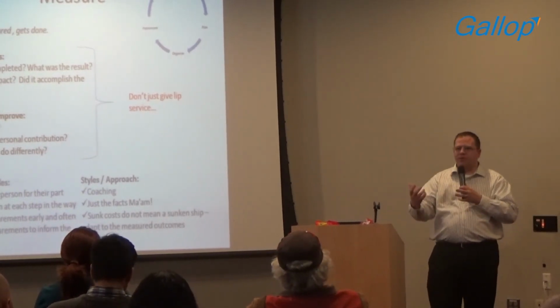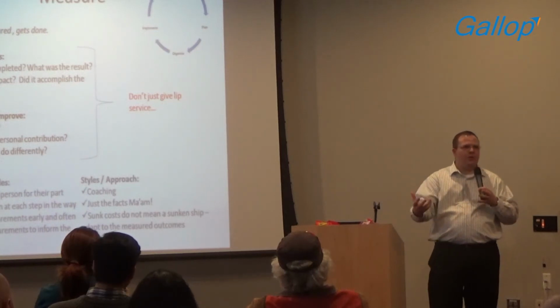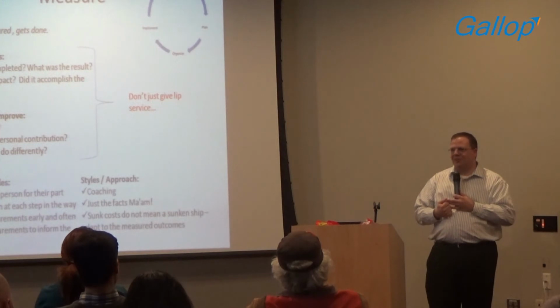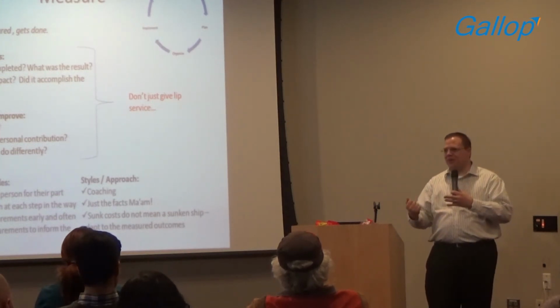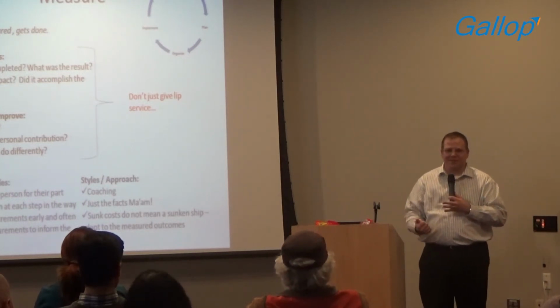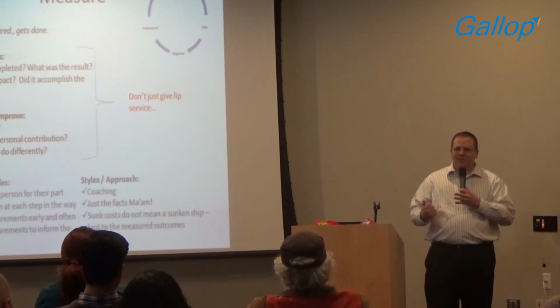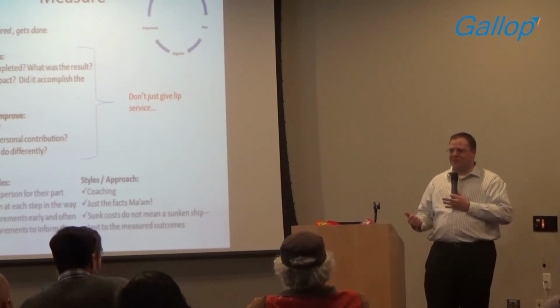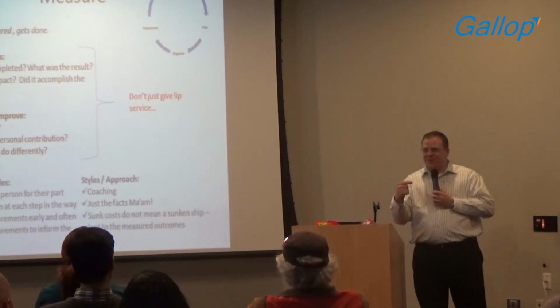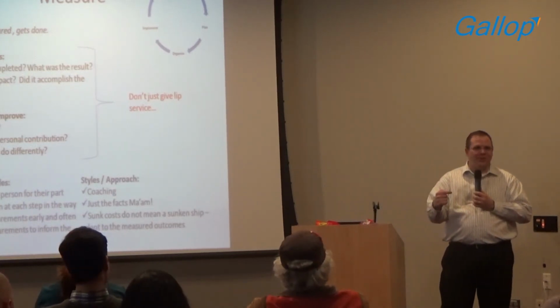So if you have a preconception that you can execute 50 manual tests a day, you're like, I can get 50 tests done today. And you only got done 25. Or maybe you got 5 done that day. Maybe you had a down day. The next day I come at it, I can get 50 tests done a day. After you've done that for about 2 or 3 weeks, guess what? There's a trend line here. You can measure. Maybe you can't do 50 a day. Maybe you can only do 30.